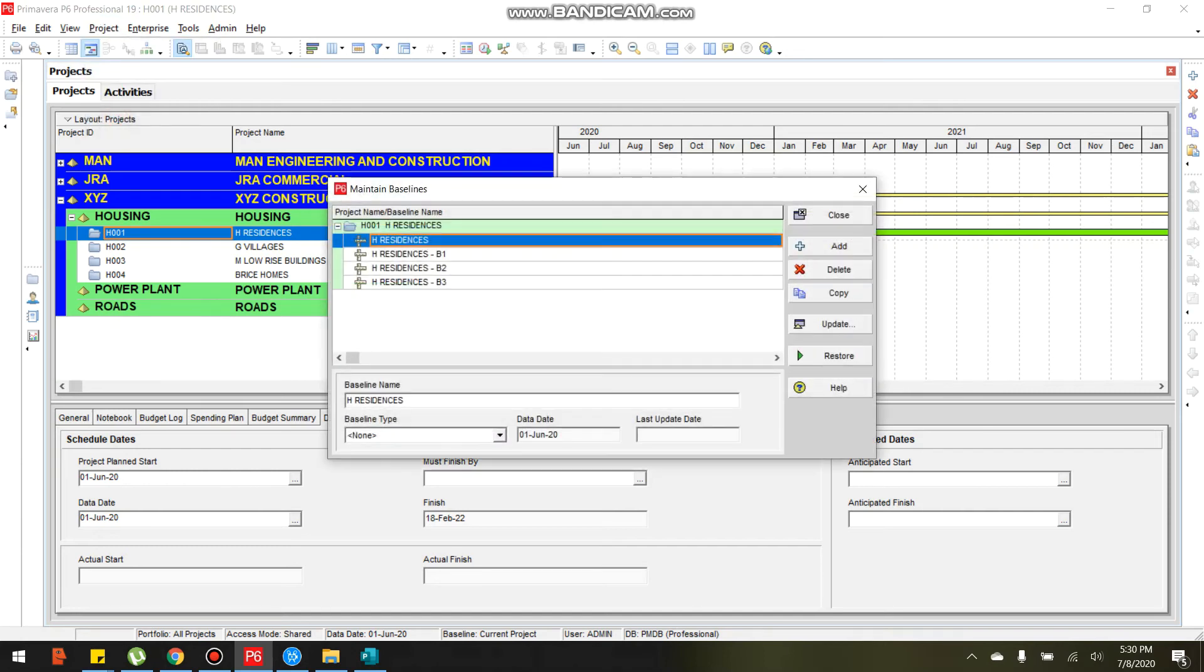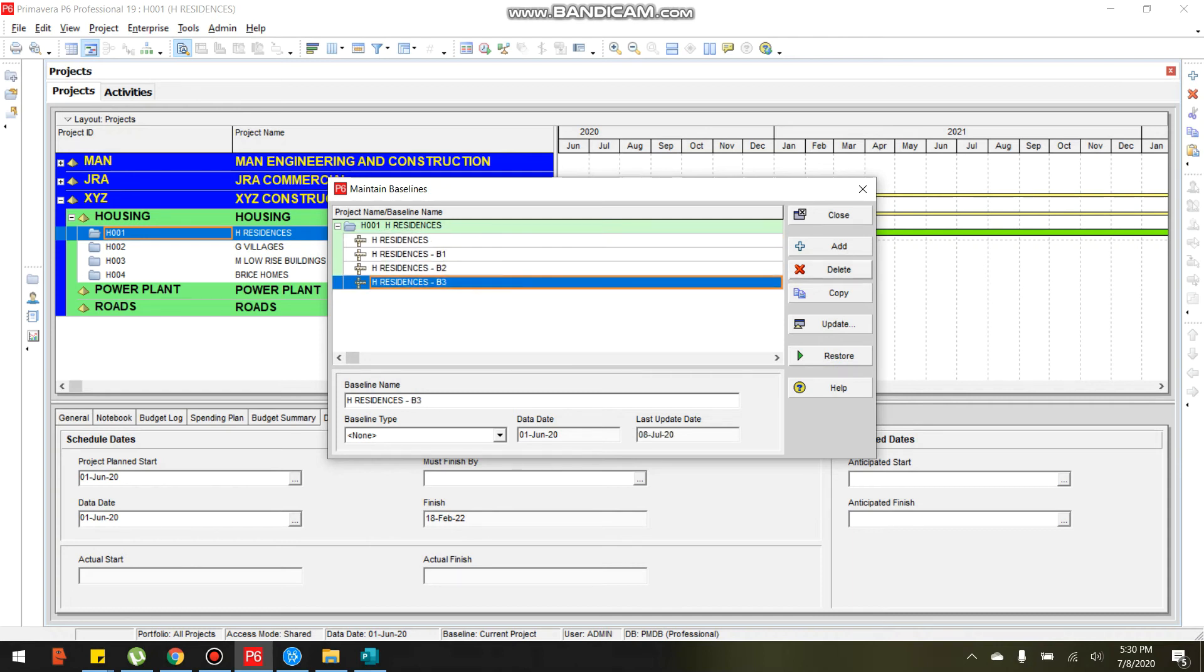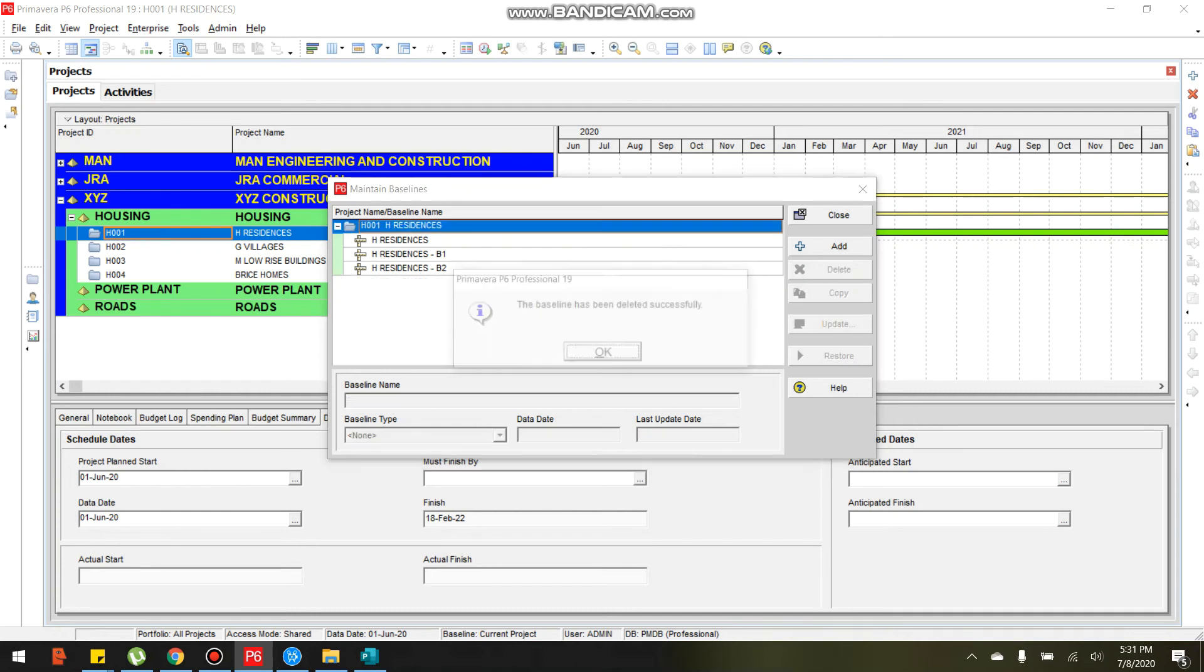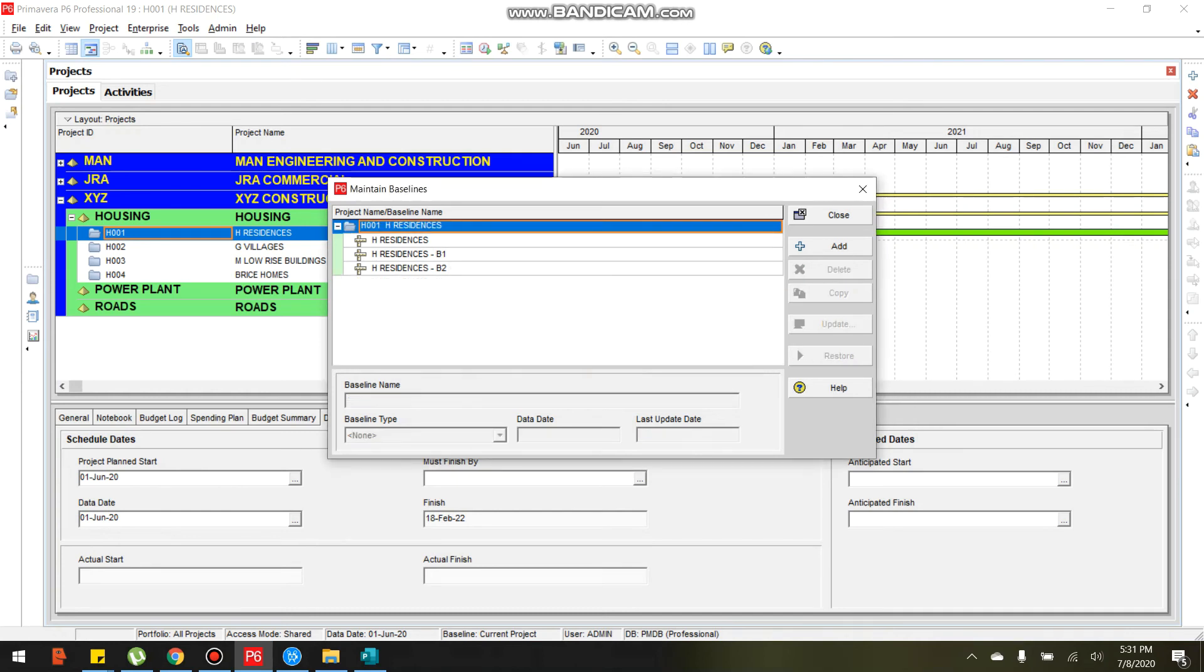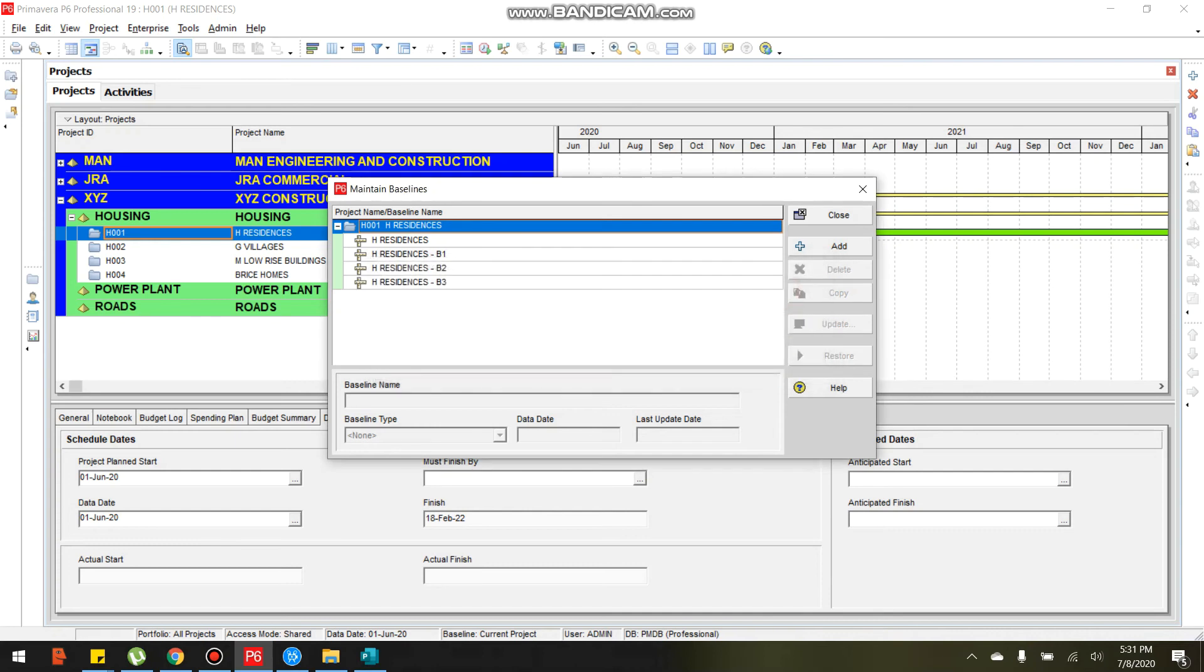This baseline we will utilize in monitoring projects. Click close. If you wish to delete or add various copies of the base project, just click select the baseline you want to delete, just click select this one, delete. Click yes. Just let us use B3. Click close.